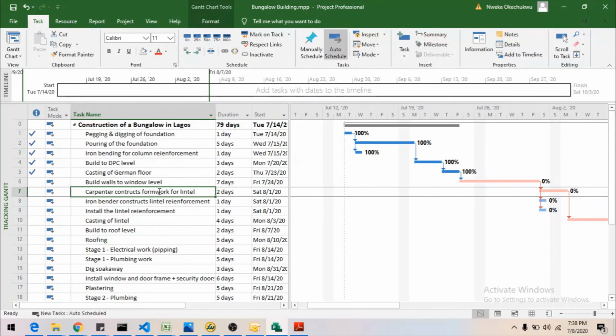Probably at the close of business every day, you can now send them updates on this file, or you can make small notes at the end of each activity. For example, if you have to build walls and windows and you want to mark it as 25% done, you can come and click 25% done here, compile this file to PDF and send it to your project sponsors, right?